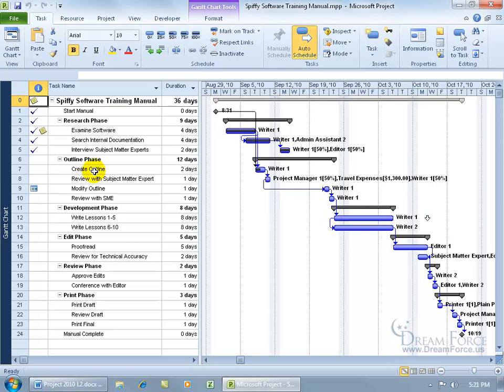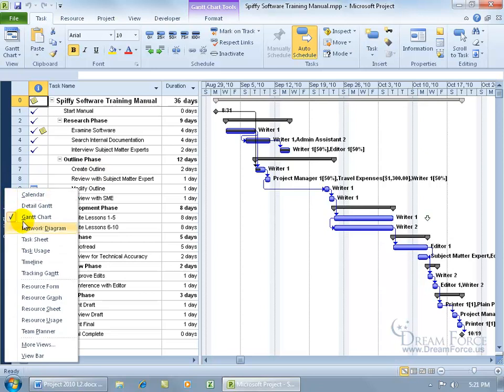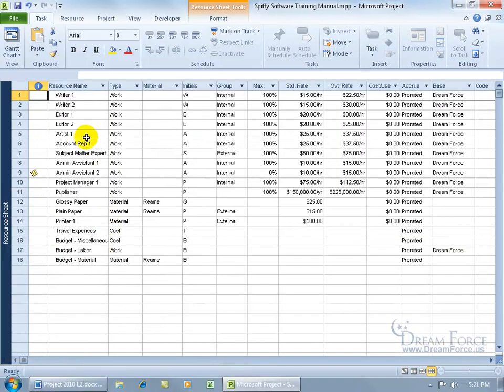So, how much is this going to cost you to assign, let's say, one resource working on a task, 1 overtime hour? Again, back in an earlier training video, we set up our resources in the resource sheet view, including setting up their standard rate, but not their overtime rate just yet. So to go ahead and set that up, come over here and right-click on the view bar, go down to the resource sheet, and there's the resource name, the standard rate, and oh, there's the overtime rate. What's that doing there? We haven't gone over that yet.